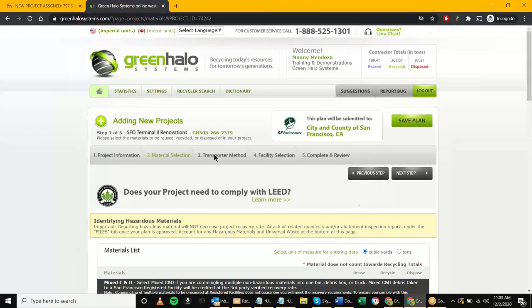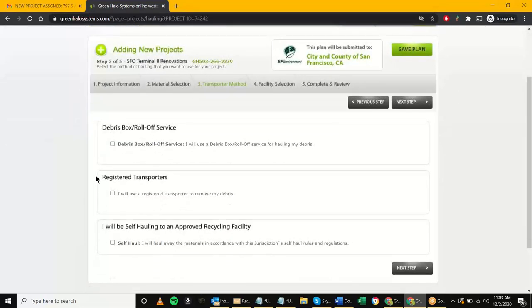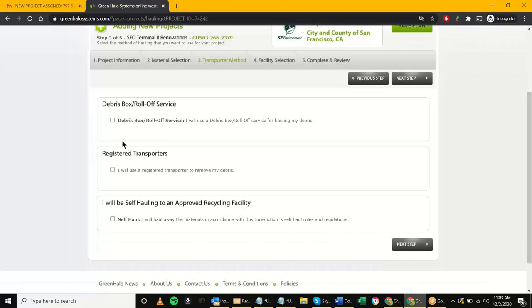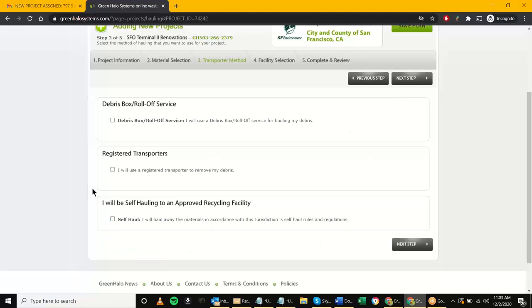Here we're basically identifying how materials are leaving SFO — not where they're going yet, just how they're getting removed from the project site. There are three transportation methods. The easiest is self-haul — if the project allows self-haul, that would be the case here. Most of these projects are going to require either choosing from a registered transporter or a debris roll-off service.